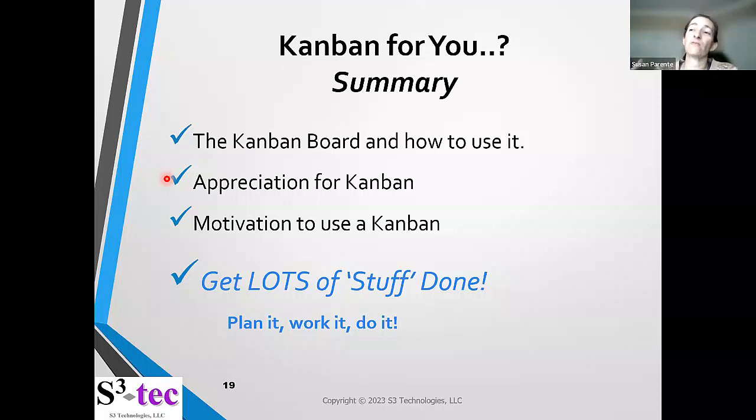I basically used Agile for one of my federal projects without the government knowing we were using Agile, by just using the task board. And I realized we had to because literally every week, sometimes every day, they would change the priority of stuff we were supposed to be working on. So it gave us a way to say, hey, here's all the tasks you've given us. Here's the priority. Here's what we're working on. And if they changed it the next day, we could roll with it. Using a traditional method would not have worked at all. And it was really, really great. It was great to use for communication with stakeholders. It was transparent, all of those things.